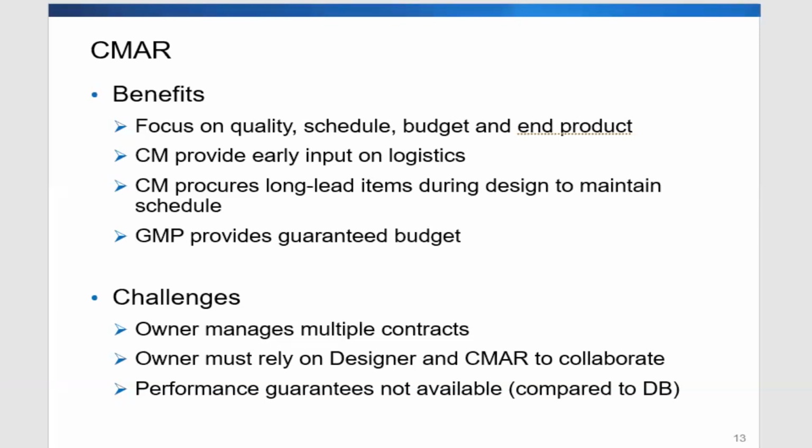And also the GMP is guaranteed. Whatever is negotiated as the guaranteed maximum price is locked in, and the contractor doesn't have the benefit of coming in for change orders and asking for more money. So this also helps the owner to maintain a fixed budget for the project.